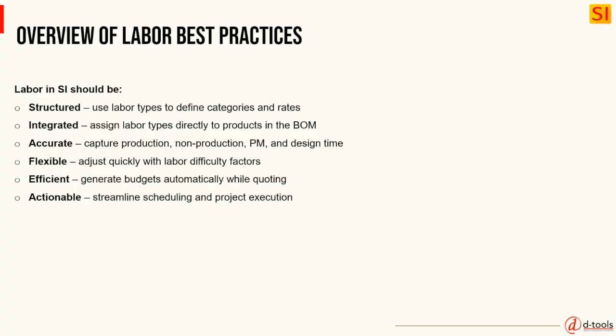Second, labor works best when it's integrated directly with products. Instead of treating labor as an afterthought, SI lets us assign labor types to items in the bill of materials. That way, as you build a quote, the labor budget builds right alongside it.